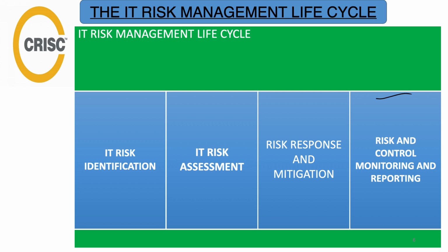they operate effectively. Once the risk has controls in place, it is likely there will be actions required to ensure the likelihood and impact of the risk are minimized. It is important that these actions have named owners in the business and dates to ensure their progress.